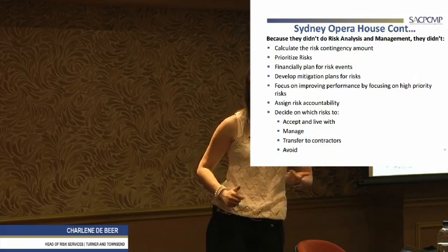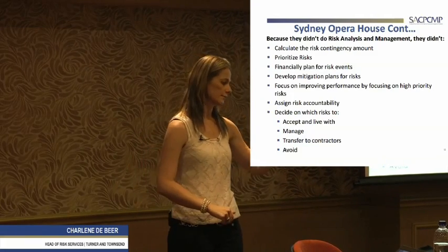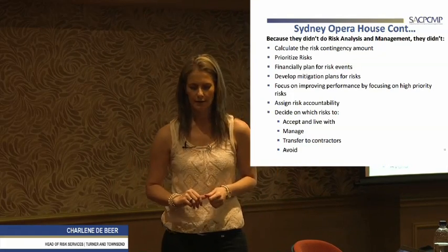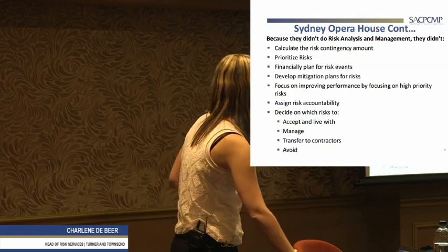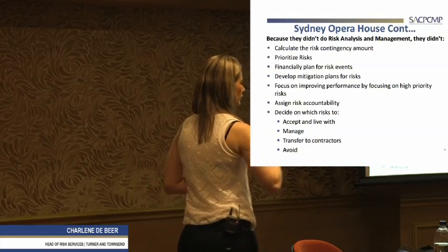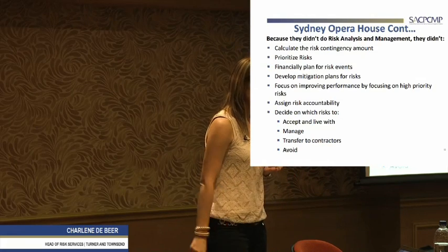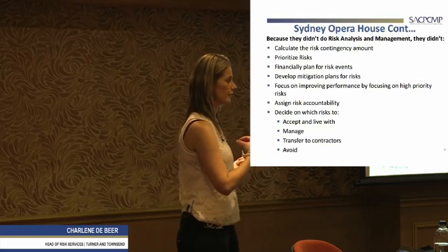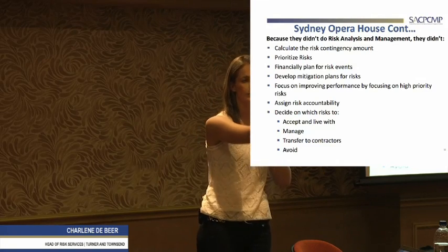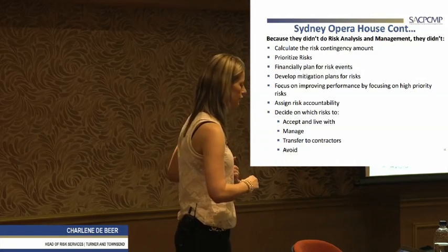If we fly them in and we buy out a production line, for example, it's going to cost us 30 million rand. But of course, we'll go and do the exact calculation, just giving an example now. However, for every week that we overrun this project, we will pay the contractor his P's and G's and his downtime, because now he's waiting for us, because we, maybe as the client, would supply the valves. It will be a free issue item.